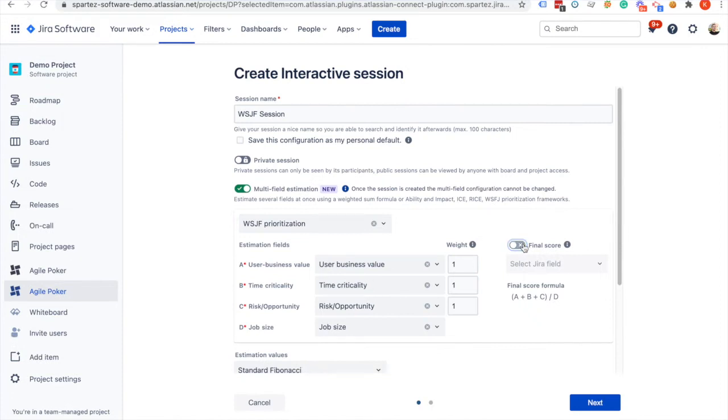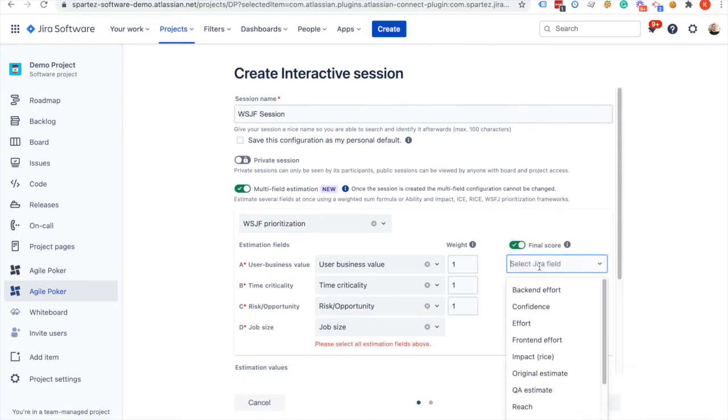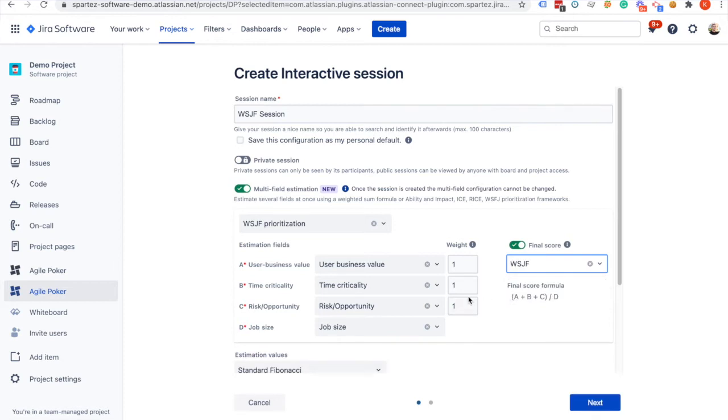Enable the final score toggle if the outcome of the session should be a value calculated based on the estimates. Then select a field for the final score and optionally modify the criteria weights.